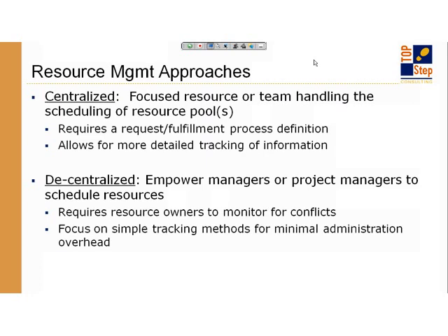But what are the gray lines in between centralized and decentralized, right? A centralized approach is to say, okay, there is a middleman, there is a traffic manager, there is a person who is responsible that you have to talk to, and they are the ones that release and give you the resources. That's sort of a strict centralized view. A gray area of centralized versus decentralized is, okay, so you have regional structures and you have regional centralized managers, so there's still a centralized team, but now you have multiple of those that are focused on a specific area of the country.